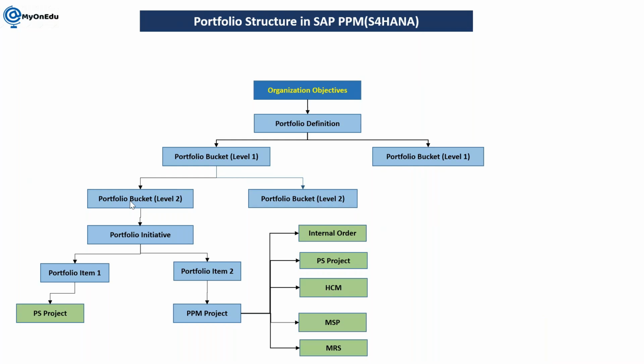When this proposal is submitted by the strategic department, it will go for analysis, to check that yes, this is as per our strategy. Once that is done, it goes for the next level of analysis, whether we can construct as per my current budget or not. Do I need to go in an individual way, like 10 now, 10 next year, 10 the year after, finishing in 5 years or 10 years, or do I need to construct everything in one go? Those things need to be analyzed. Location needs to be analyzed. So many things need to be analyzed, and then it will be taken forward.